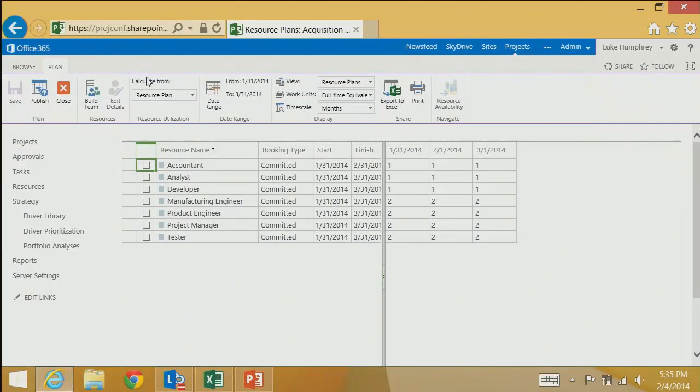If you are not using resource plans, it is an easy way to provide your resource estimates without having to build an entire schedule. If you are still in the scoping stage, you will not have a good schedule to base off of. You don't have all the tasks identified and all that stuff. So resource plans give you a high level view. Your resource managers will love it because this is how they think. They can tell you, okay, you need these 5 resources, I can give you 1 full-time equivalent for the next 3 months. That's how they think.